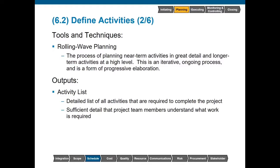Plain language becomes necessary. So if we're talking about renovating a kitchen, it could be: strip the wallpaper, apply primer, sand walls, apply paint, remove countertop, sand cabinetry, paint cabinets. Right there, we're giving discrete activities — these are things that must be done to create value, and at the same time it's written in such a way that people know what is expected of them.